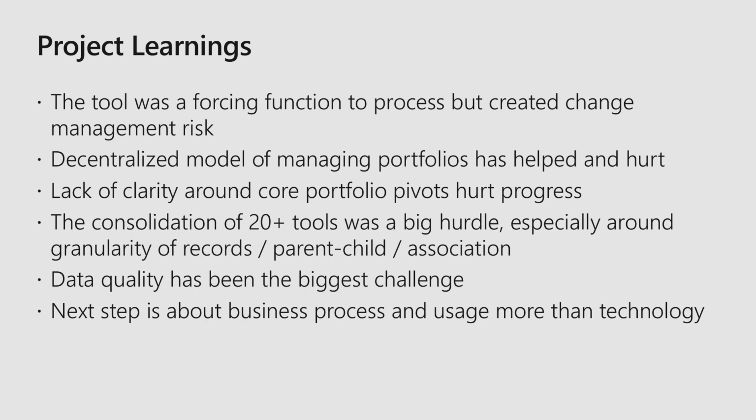Data quality has been the biggest challenge. As I mentioned, project task-level data can mean something very lightweight to some people, sort of like a planner: I just need to do these 5 tasks. Compare that to a typical PM, who tries to consolidate and has internal rules, like maybe I don't want to create a task that's longer than 8 hours, all the way up to other people who just say, I'm going to do something for the next month. Getting parity on that across everybody was extremely difficult. And then ensuring that the data behind it married up, so that the reporting was accurate, was difficult too.